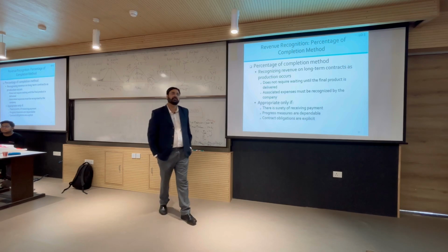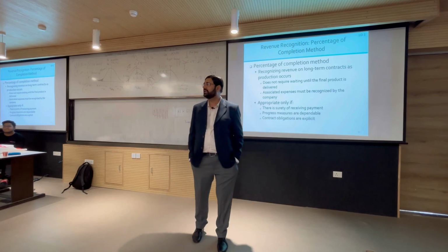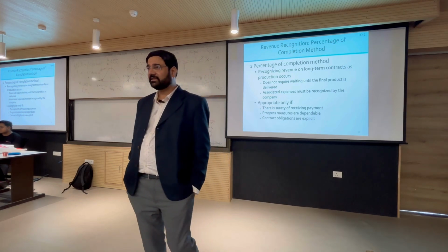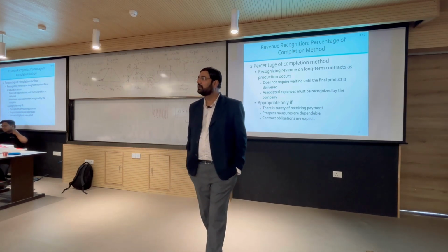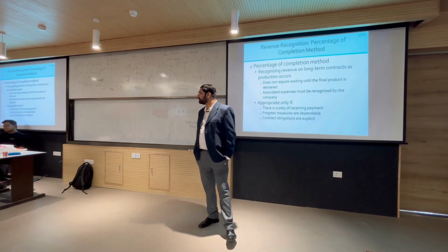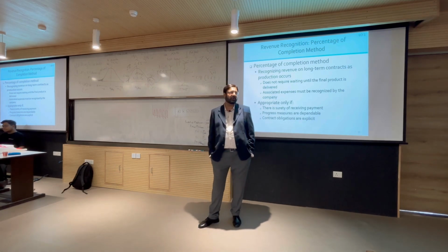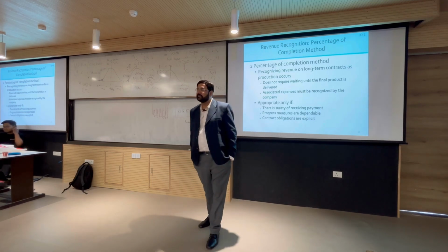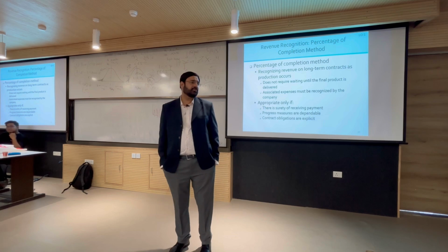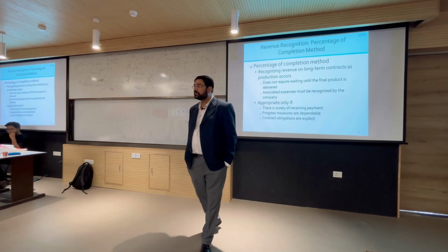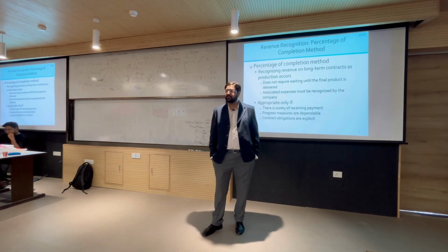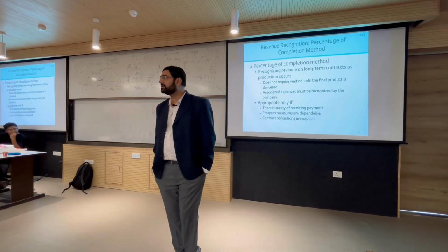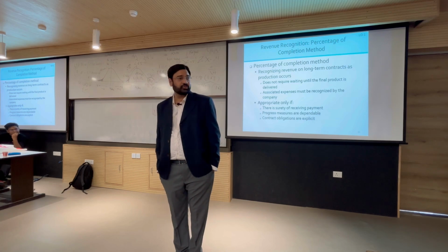This case, which you will see very often in life in case of projects, is called as a time overrun, because the estimated time to complete the project was 2000 hours, but now it will take us several more months to complete the project, because the estimated time has shifted from 2000 hours to 2400 hours. As a result of extra hours, we still have to pay salaries to our employees, right. So, let us say we have to hire one more person to do the job.